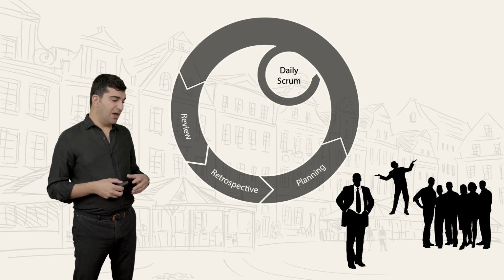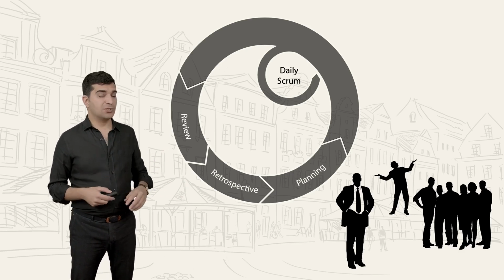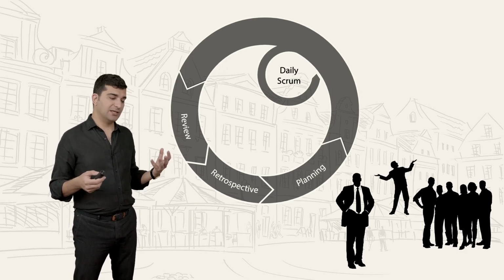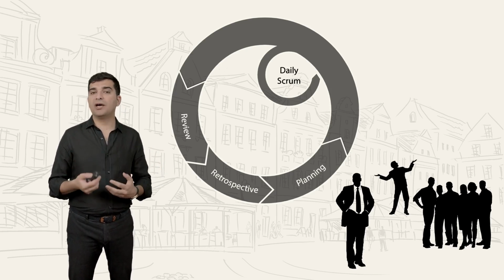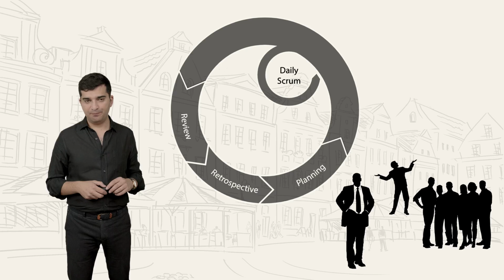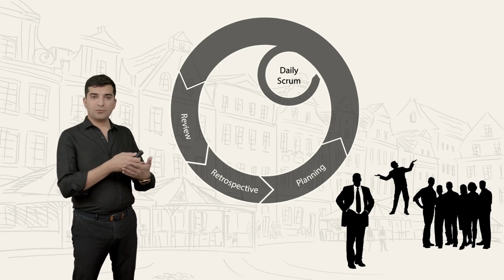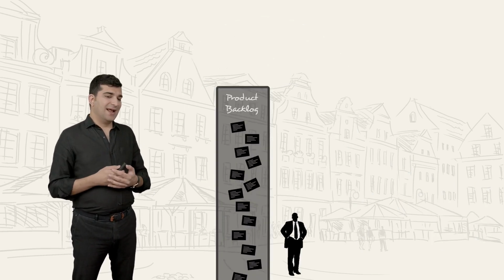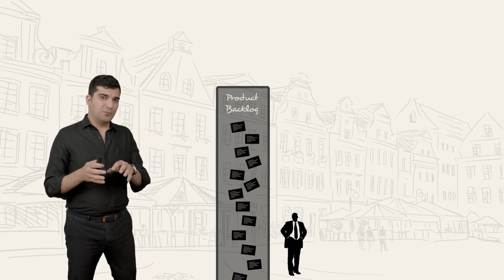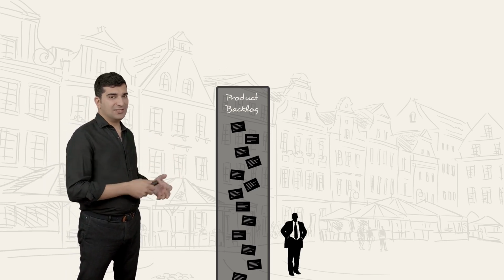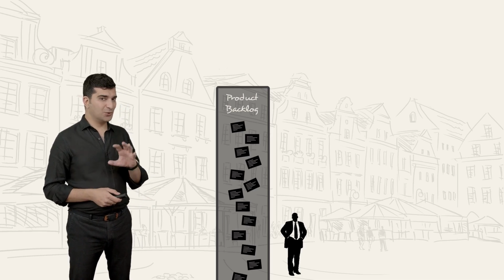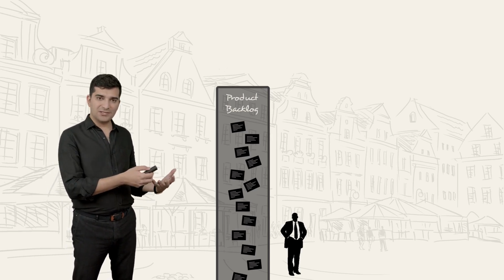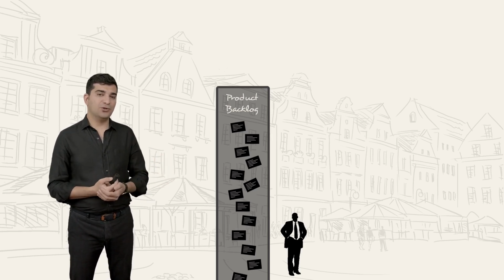So maybe one day the developers are working, and the customer calls you and tells you about some new ideas that they have about the software. In that case, you will compose a new item based on what you understand. And at that time, or a little bit later, you will go to the developers. They have to be involved. It's not only about you, because the item that you create should be realistic. You go to the developers and explain the new item.